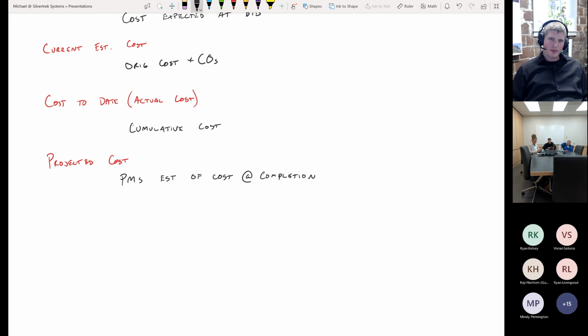How much are you going to spend to finish this job out? And every month you need to be looking at your cost, and every month you need to make a more accurate estimate of how much you're going to spend. So in the case up above, we said it was $120,000 we were going to spend no matter what. But of course, that is not actually what happens in real life.